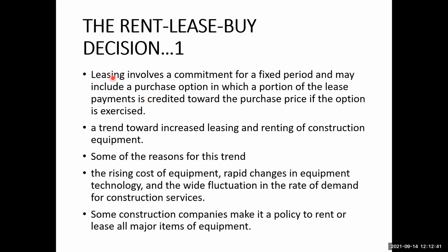But in leasing, there is some fixed period for which you have to commit that you will rent that equipment. So maybe 1 year, maybe 2 years. Although you will be just leasing it. Leasing is not purchasing. You are not the owner of the equipment. So this is the difference between leasing and renting. Leasing comes somewhere in between buying and renting.